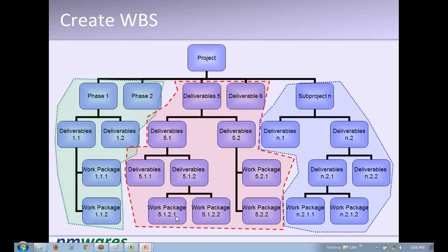So normally I give a ground rule: depending upon your project, you have a review cycle. Some projects are reviewed weekly, some monthly, some bi-monthly, some fortnightly. Based on that, you stop at a place where the work package becomes so big or so small that in one review cycle the progress can be measured significantly.